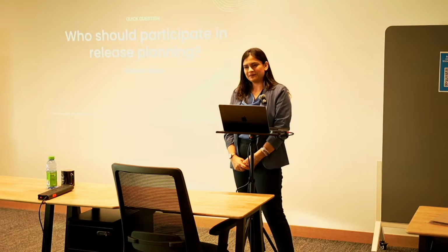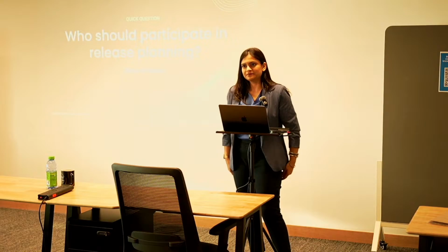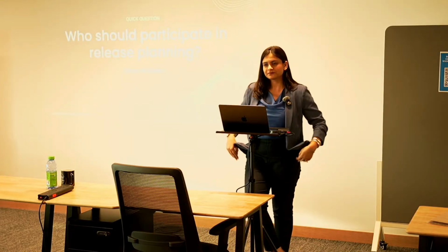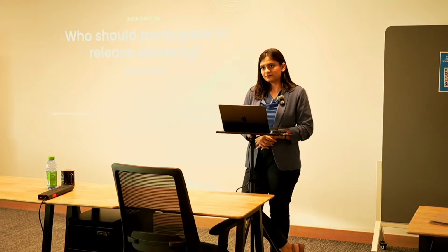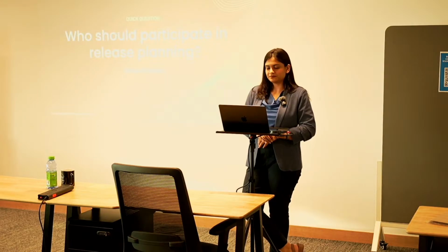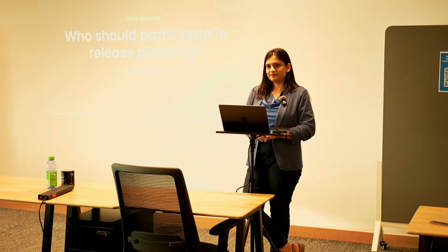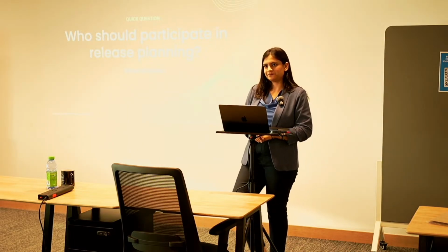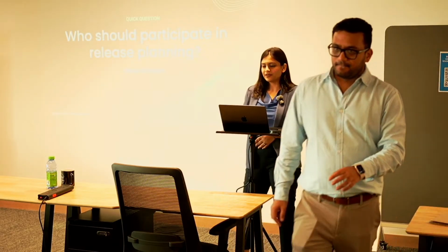Not in terms of roles, but generally, I would say somebody from the business side. First of all, the audience should be limited. It shouldn't be across the team or wider group. But somebody from the business side, tech team, QA team, and then infra team as well. So important stakeholders who are taking care of different areas of the project or the product that you're working on. So a representation of each group. Correct. That's the bare minimum needed for every release plan discussion. That's a great take. Anyone else would like to add?